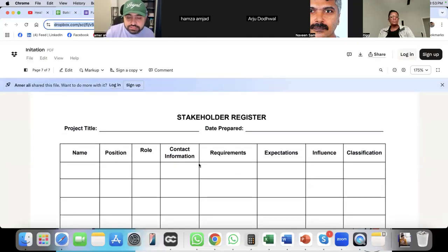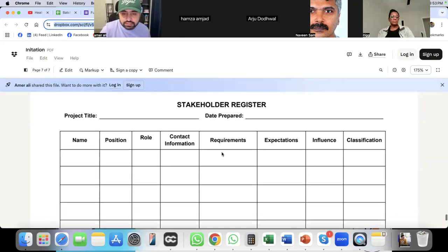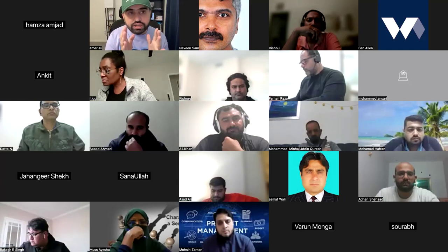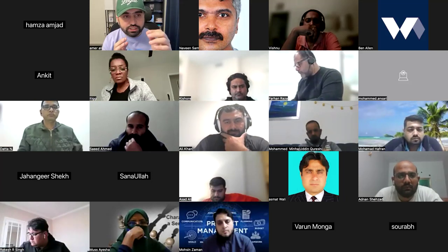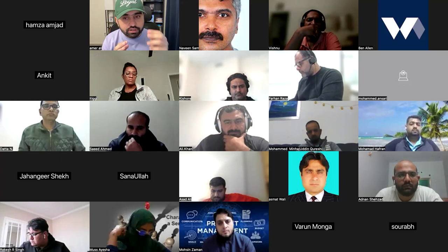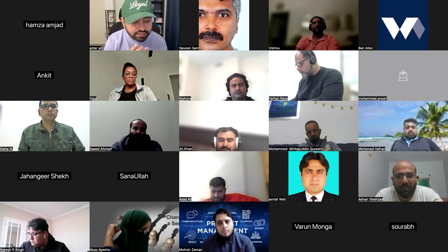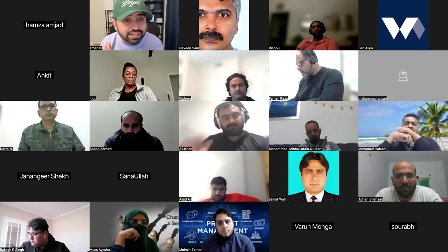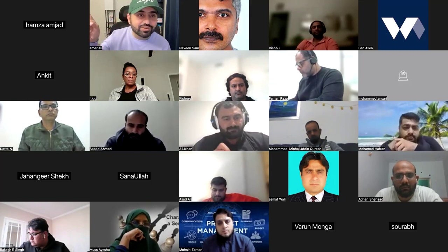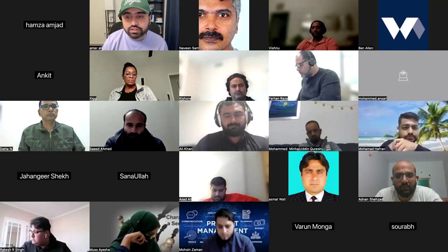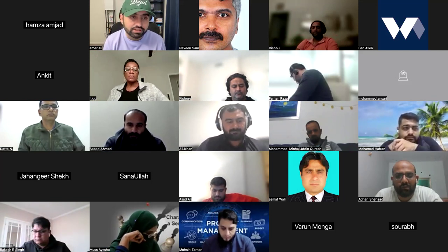So Hamza, are we going to write something like that, that we need to evade them or something like that? Let me give you. The stakeholder register will only have the information: who is the stakeholder, what is their power, what is their interest. How I'm going to engage them, the strategies, is in the stakeholder plan.